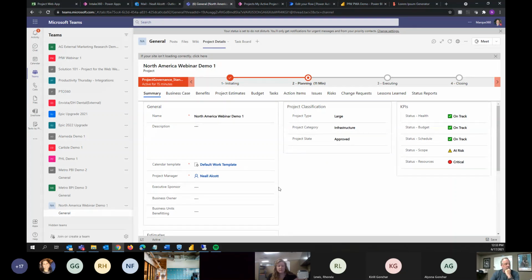So that's a great question. I think currently the maximum number of tasks you can have in a project for the web project is 500. They will be increasing that number, but that's the number they recommend that you stay within. If you need more than that, you probably should stick with Microsoft Project or Project Online currently.